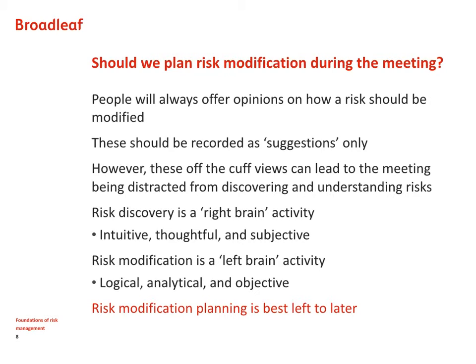Our advice is not to consider risk modification, risk treatment if you will, within the risk assessment workshop, but to do that on another occasion. Particularly to do risk modification in terms of a series of small meetings held with risk owners. At those meetings can be the facilitator, the risk owner, together with any other specialists who might need to be present to examine potential risk modification options.